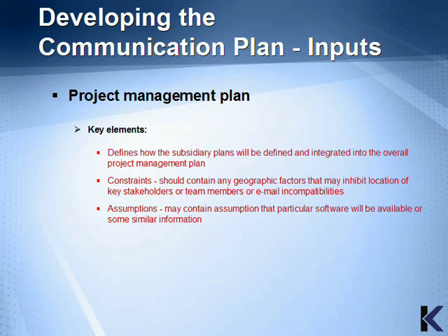The project management plan should be considered the master plan where all other smaller project plans are a subset of it. These are also known as subsidiary or ancillary plans, and we go through each one of them throughout this CBT. Key elements that are used as an input to the communications plan are the guidelines, standards, and templates that the communications plan should follow. Remember, the project management plan defines how subsidiary plans are to be defined and integrated into the overall plan.